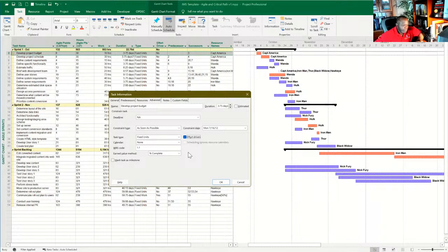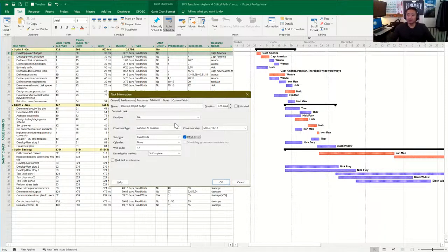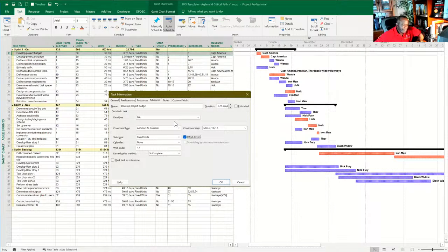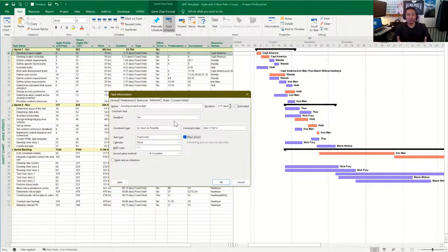Also, the other thing is I try to encourage using deadlines instead of leads and lags. Absolutely. Because it keeps the critical path in shape. It doesn't hinder it if you use deadlines. It doesn't restrict it. Yes, correct. So this is a good one for Jam.